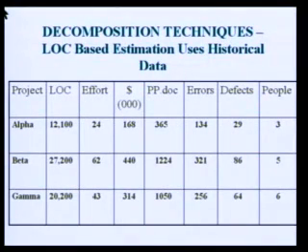It means that 12,100 by 24 is going to be the code written by one person, meaning the number of lines of code in that particular programming language or whatever language used, written by one person in 1 month. In the case of beta, it is 27,200 by 62. In the case of gamma, 20,200 by 43. Basically it is giving the productivity idea to the project planner or project manager.